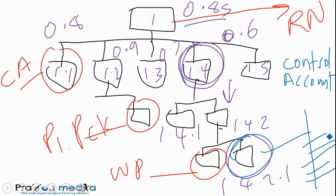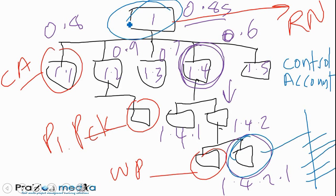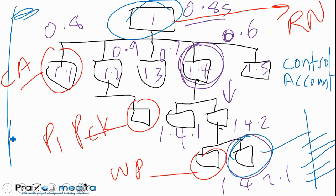It's pretty much thinking about Create WBS beyond what you've got in the PMBOK guide. Definitely know the inputs, outputs, tools and techniques. But try to live the process in your head. I've got a project to do X. Start at the root node. What are the different pieces that make up X? Then break them down into 1.1 to 1.5. And then what makes those up? That approach to creating the work breakdown structure is known as a top-down approach. You're starting from the top and going down.